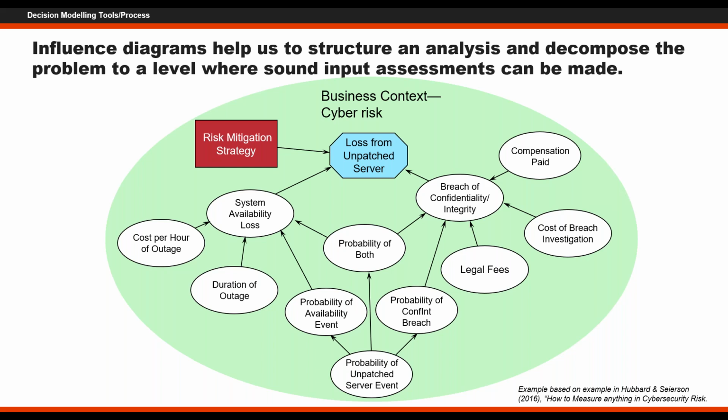Yeah, and I would say the high-level fix that came out of Warwick's presentation on heat maps is to turn the two dimensions into scales. One is probability of loss, in actual numbers, and the other is the expected consequence of loss of the event. The expected consequence you might get from a 10, 50, 90, for most situations. For the early selection, you don't need any more precision than that. For the later stage, you pick out the ones where you say, look, these keep rolling.